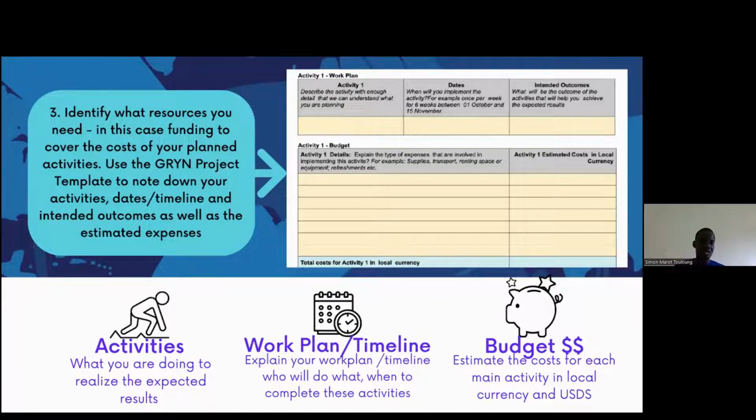your work plan or the timeline. Just an estimate, a rough timeline or schedule for it. When will you do each activity? You will also need to have a more detailed action plan of who in your team will do the activity, when they will complete the planned activity, and how you and your team are going to complete it. So we just need to see an overview of when you will do what you say, so you feel confident that you have thought through it, and